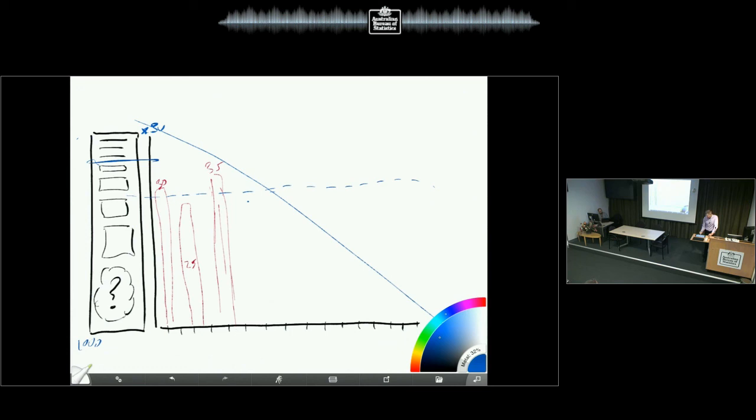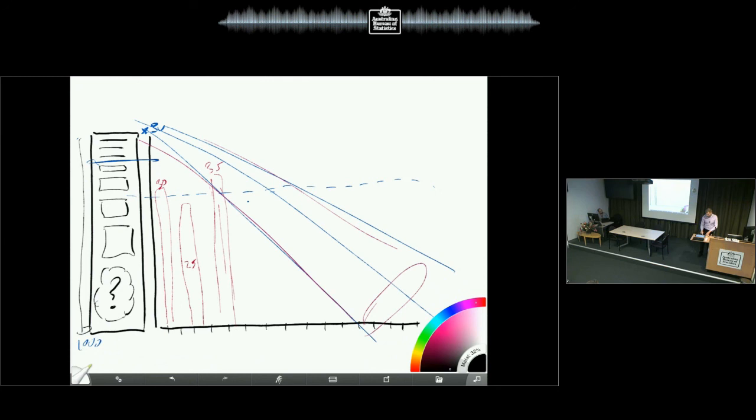So what we can do is go to the stakeholders and say, based on the last three sprints and the average of what our velocity tended to be, and we've done a very broad brushstroke of what the whole product backlog looks like, we think it's 1,000 points. We think we can finish the whole thing in however many sprints. At best, if we go at the fastest pace, this date here. At worst, it's going to be somewhere around here. And then we can have a conversation with the stakeholders.